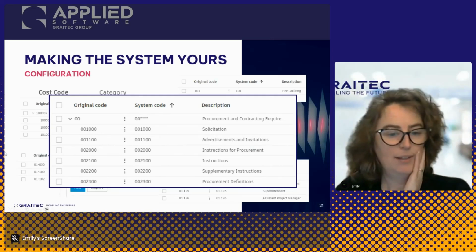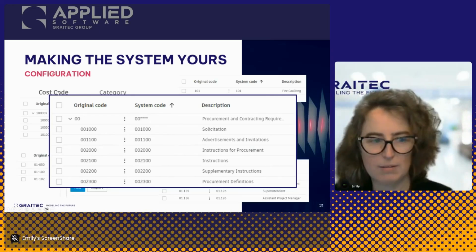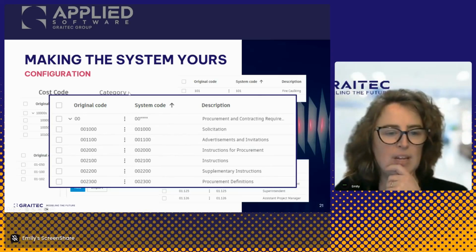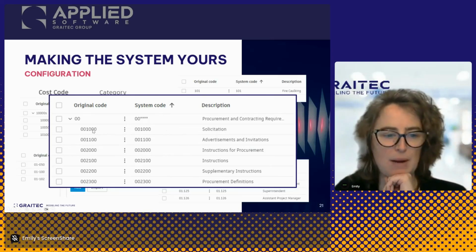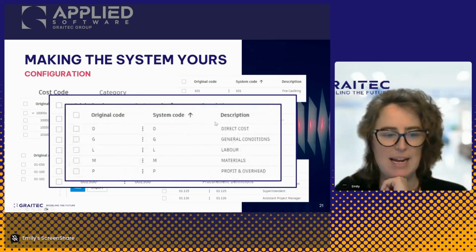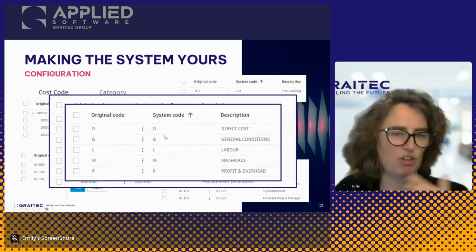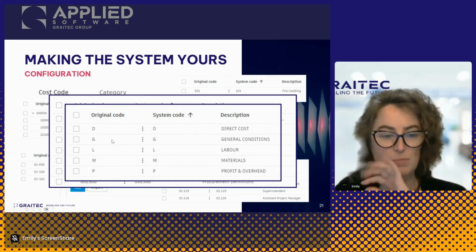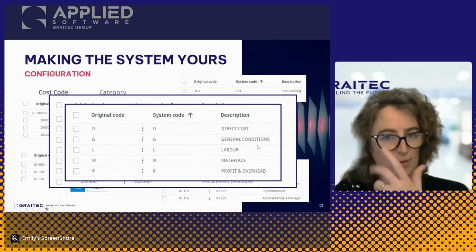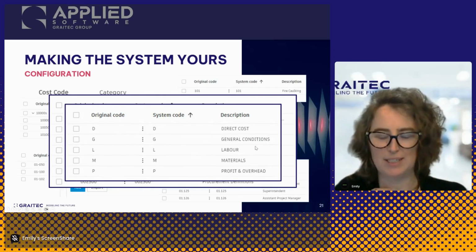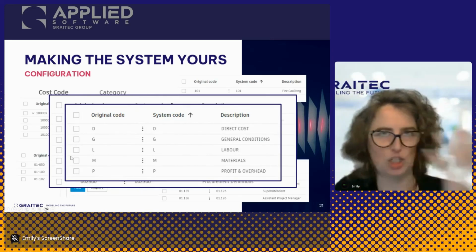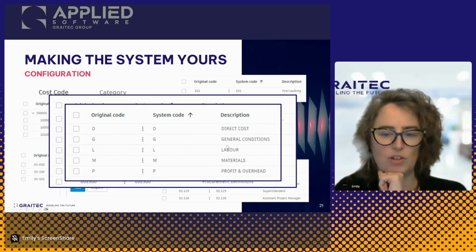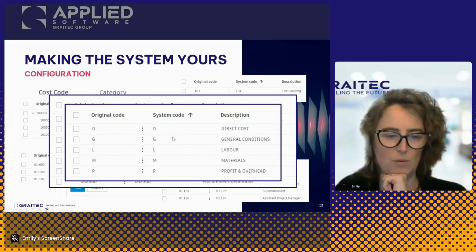And then once I have that first segment, that would be this cost code segment here, then I have the category if I need it, or any other segments that I want to attach. So my budget item is going to be this dash labor. Okay, and so we can upload a 1-digit, a 3-digit, 2 numbers. It doesn't have to be anything. These are all completely customizable. We just want them to be organized and understandable from your system point of view. And so the description of, if I put a -D after one of those, it's solicitation direct cost. So we're going to build in all of this stuff in your budget code.